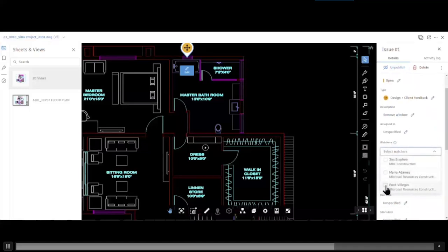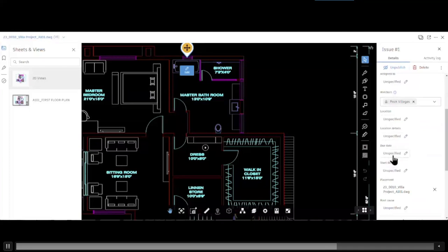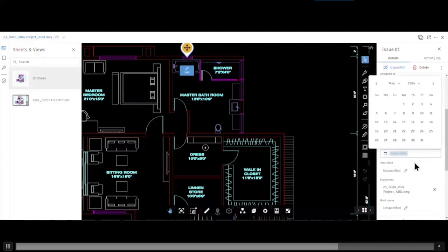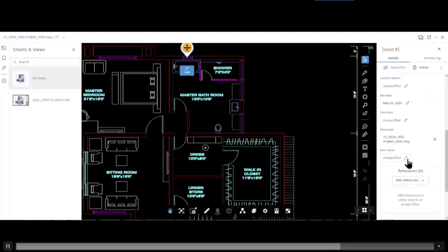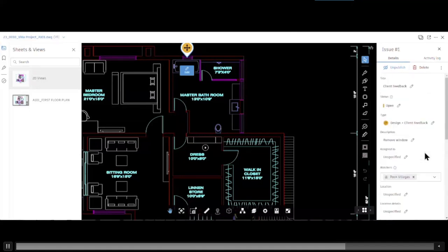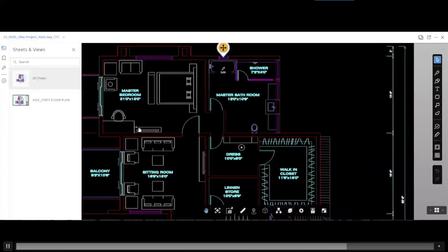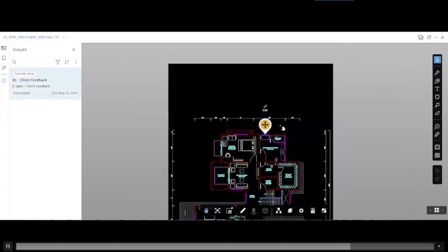I can see who are the people that are watching this. So who will be watching meaning reviewing. And I can also say when's the due date. And I can add other reference to these, like another file or other documents in my project. So now that my issue has been created, I click here on the issues log on the left side and I see my issue is added to the list.